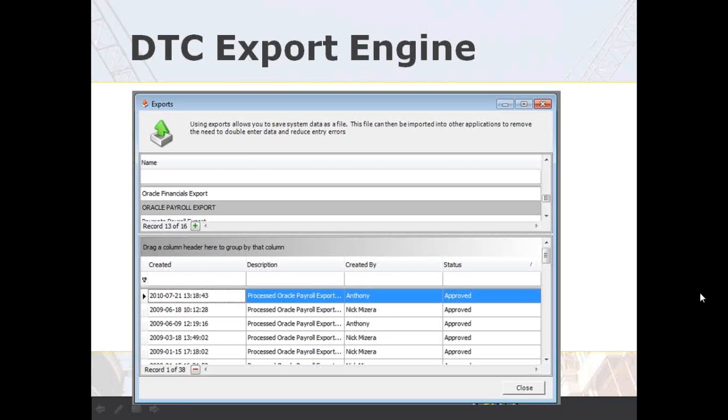So if you're a large organization and you have a civil construction division and an industrial construction division, and you have standard cost codes for civil, but you don't have standard cost codes for industrial, we would just tailor each export process to fit that particular business unit's requirements, overriding cost codes on the industrial side, but sticking with the standard cost codes on the civil side. We can even get to a very granular level where we're building unique exports by project or by region, whatever you require.